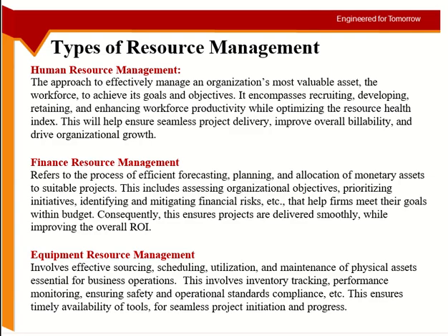Like, okay, I need to give the contractor 10,000 BD in the end. But when should I give it? Should I give it 1,000 every month, or half at the start and half at the end? This is all part of planning. And then you allocate your money to suitable projects. You do it at the organization level: how much money you have, how you are going to plan and forecast, and then you distribute it into the projects you have, because money is central.